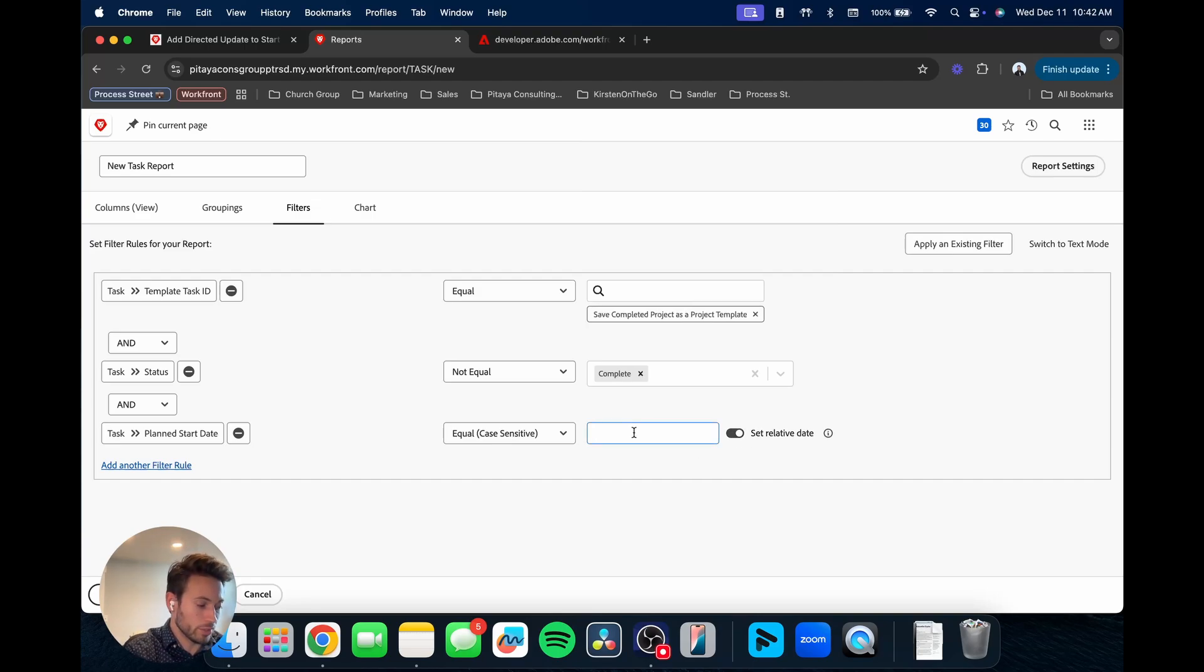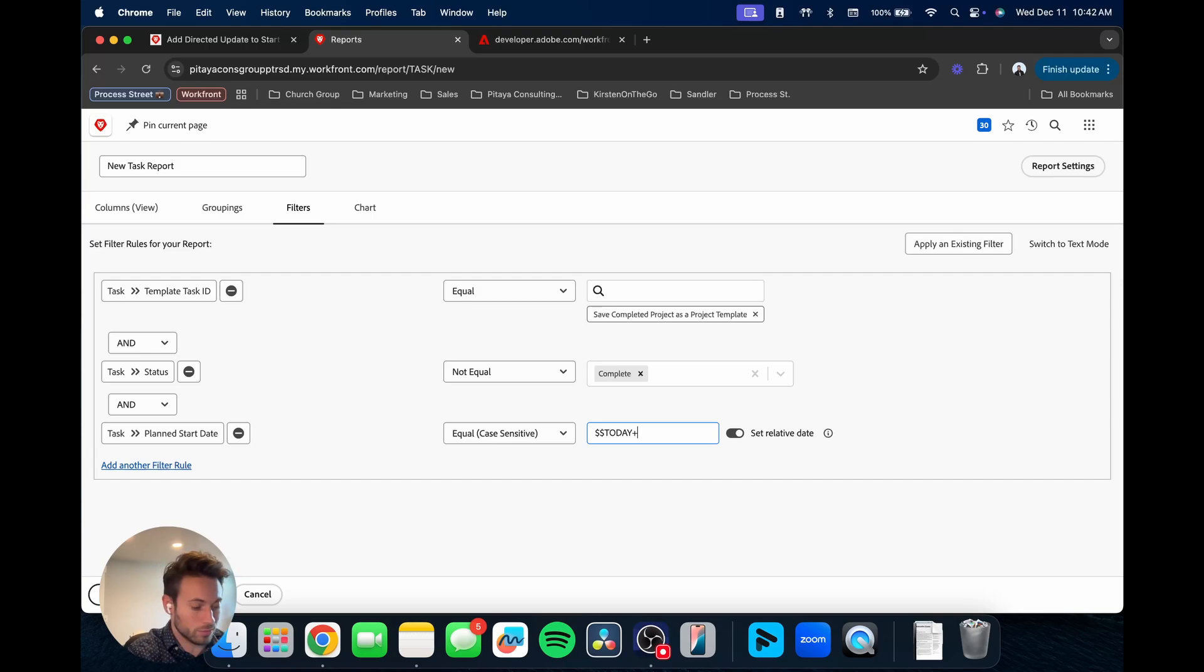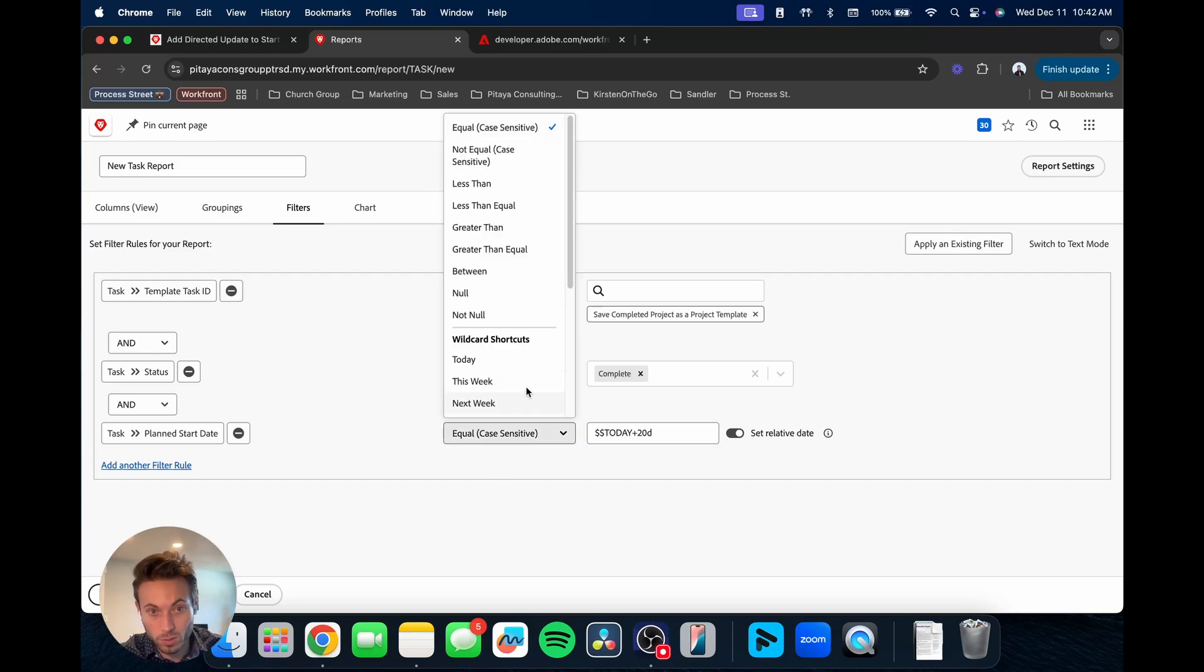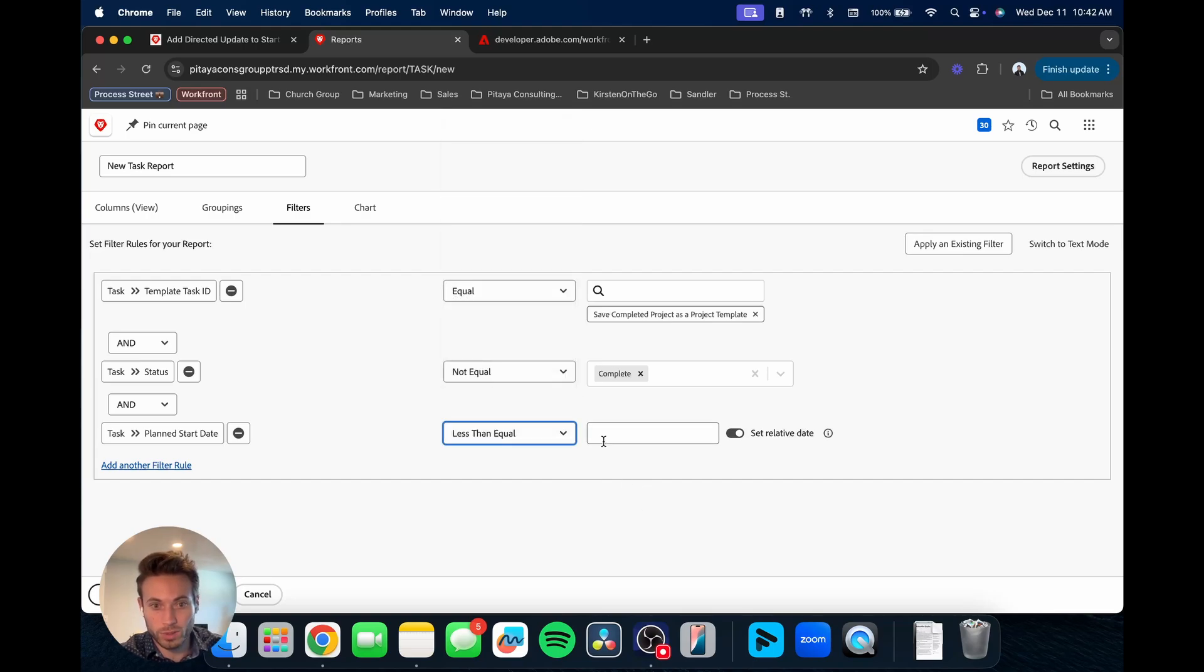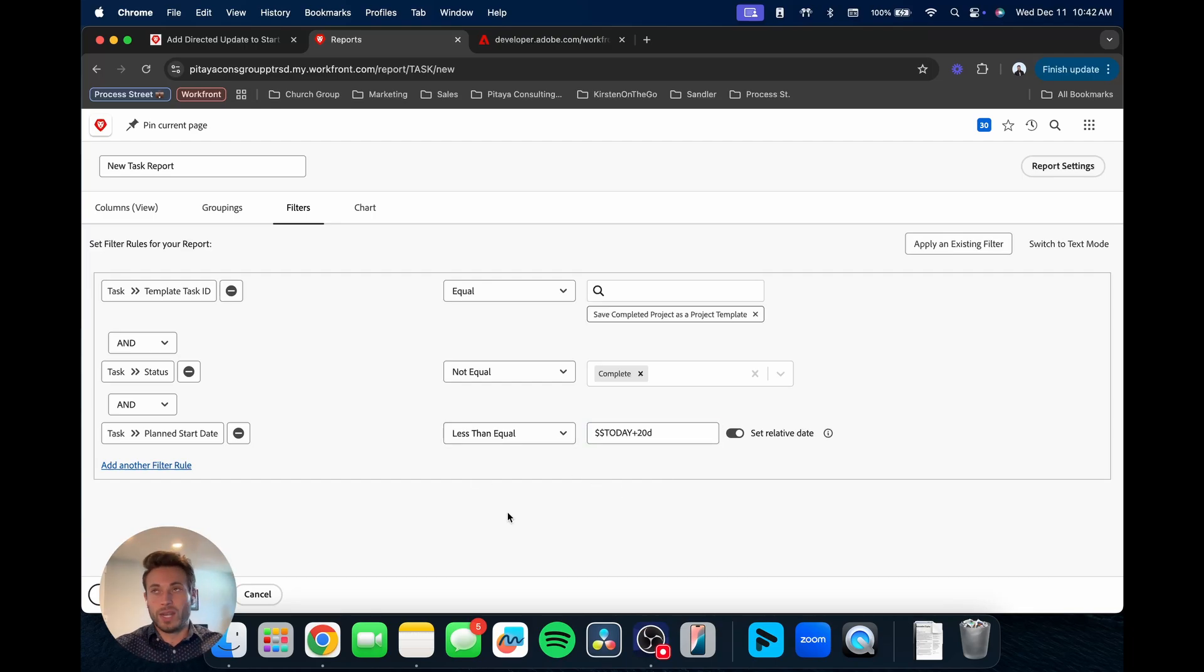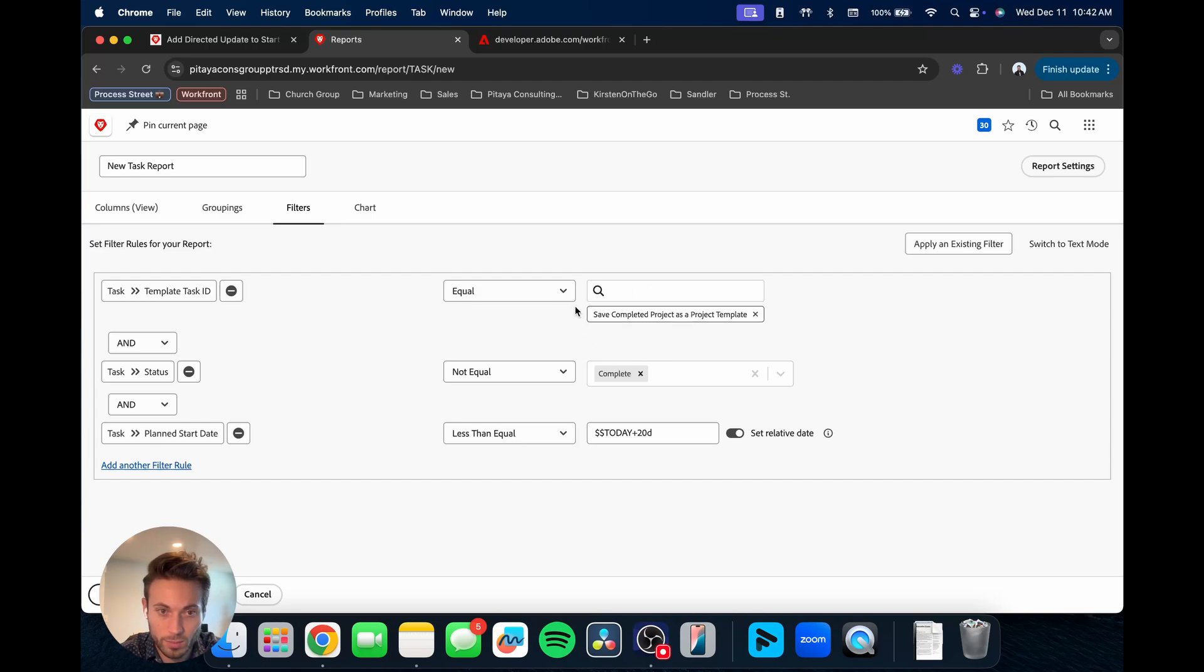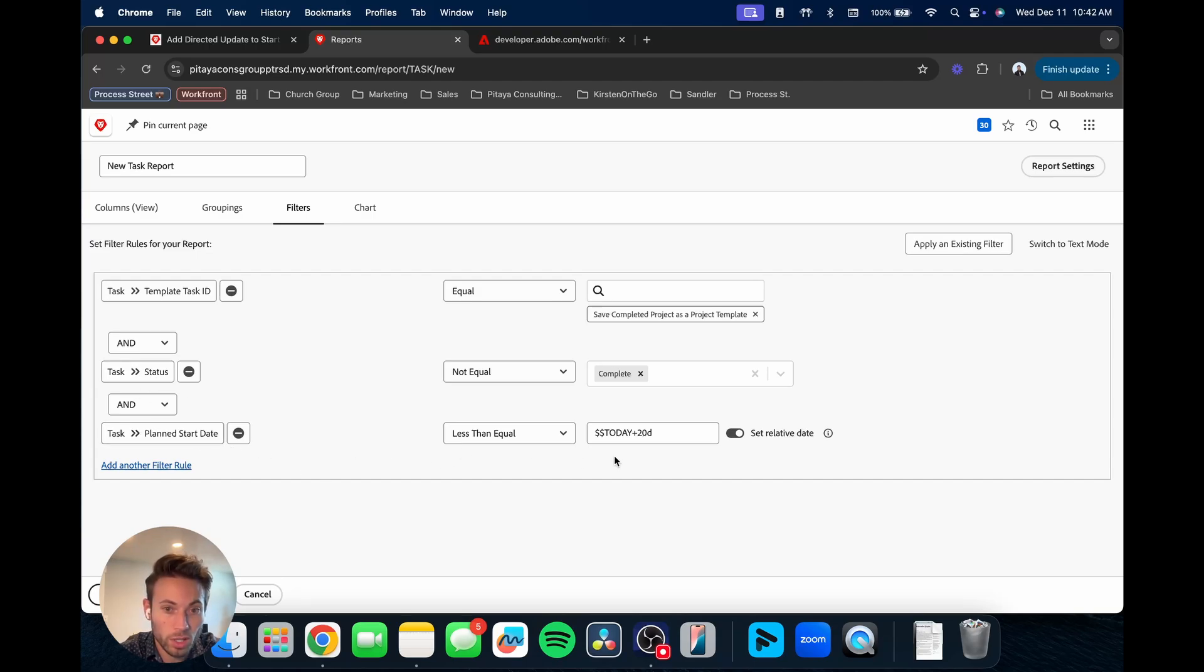We want it to always be basically less than a month, or 20 working days is a month. And so we'll do a relative date instead of a hard fixed date. So we'll just toggle that. And then here's the only real, not coding, but kind of more customized aspect to building this report. But this is still pretty straightforward.